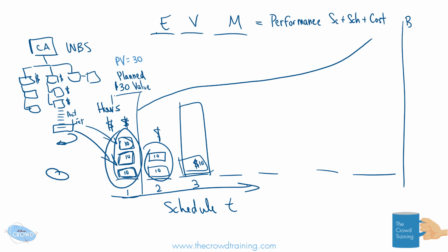Now, by day 2, we would earn or expect to earn, or plan to earn, another $20 worth. And then here, day 3, let's say another 10. But we say the planned value, though, we don't lose the value we've earned in day 1 and the value we've earned in day 2. No, those are accumulated. If, in fact, we have earned what we plan, then the plan is by day 3 here, we have got the $30, the $20 worth, and now another 10, which combined plan is 60. So that's why this line continues to go up.